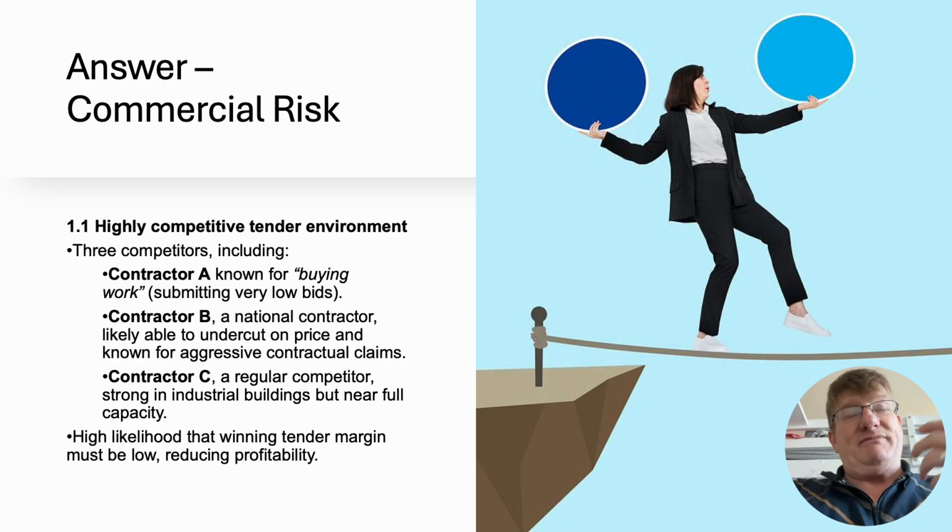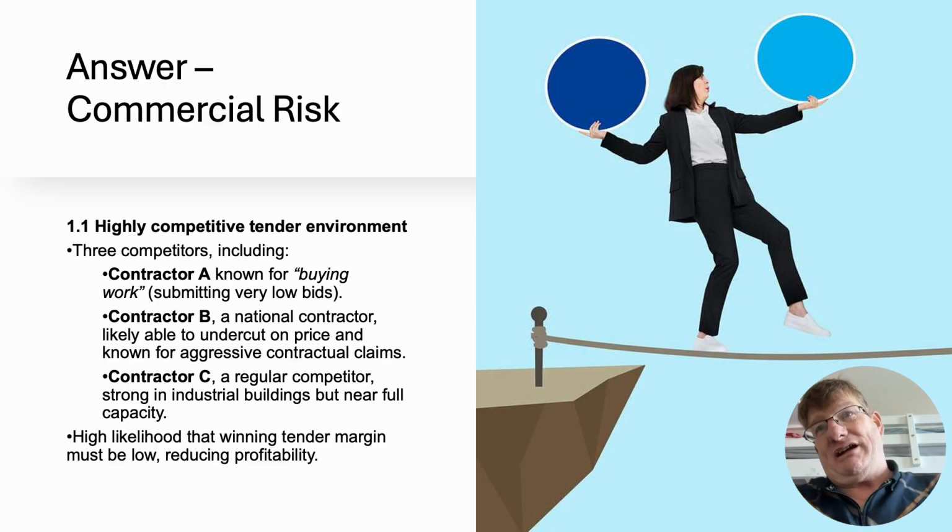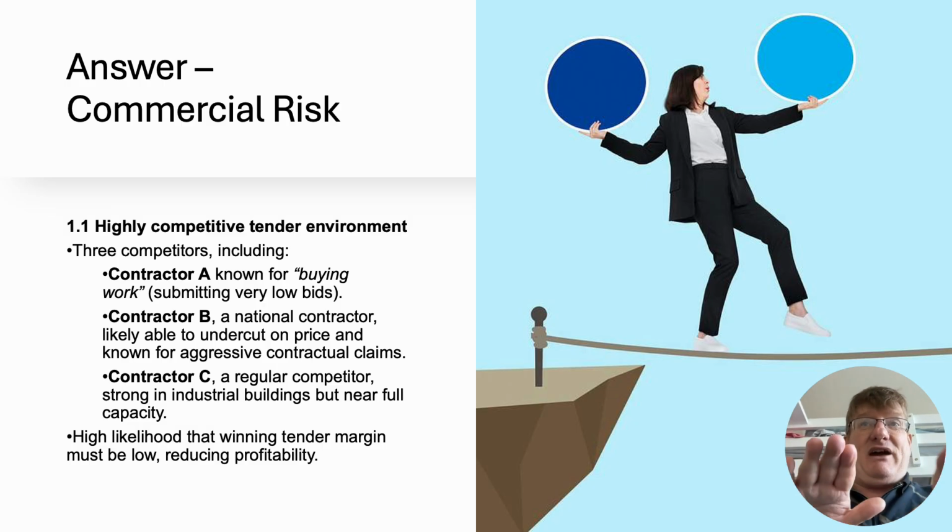If I'm a subcontractor and I'm working for, say, Kia, there's less chance of you going bankrupt than, say, a local contractor. So I know that my cash flow may be a lot better with a larger contractor. Therefore, I might offer you better rates, as in a lower rate. That might then offset the higher overheads that you have to charge. Okay, so I'm just adding that on there.